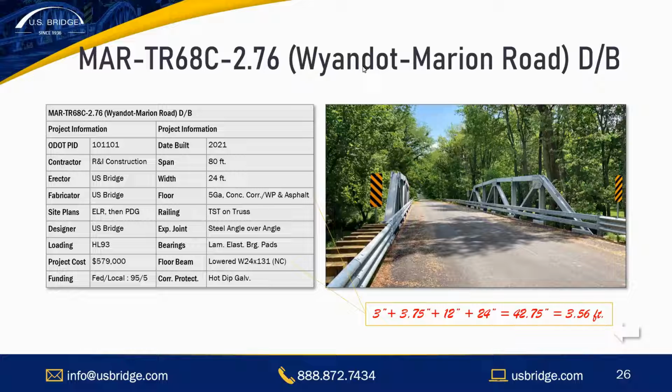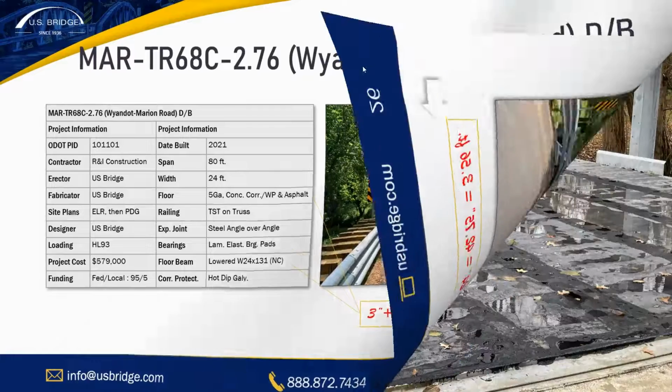It was a design build project that was worked on by two sets of consultants, one to put the package out as a design build proposal, and then once it was awarded, the contractor had to hire another engineer to develop the full details of the whole project. And we were part of that team to provide the steel details and steel design of the bridge.